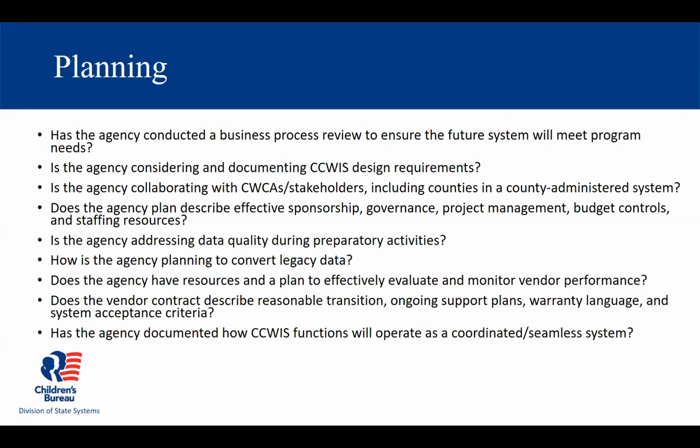Now, rather than read through this list, I'm just going to focus on a couple of them that I wanted to bring to your attention. One was, is the agency considering and documenting CCWIS design requirements? If you're in planning, and you haven't looked at the CCWIS design score sheet and technical bulletin that we have, this is a good time to look at it because it will help you plan for ensuring your system will meet the CCWIS design requirements. It could actually be very helpful in helping to draft a statement of work or requirements for an RFP.